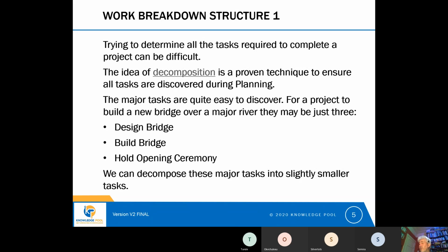You might think that they might start to build the track before the entire route was complete, and indeed they may decide to do that. That is one way in which the engineers in the 19th century would have optimized their project plan, and that would be by starting some of the tasks while other tasks were still underway. So this idea of decomposing the tasks down into smaller and smaller tasks, that carries on until there are no more lower level tasks that can be discovered, or more likely that the tasks start to become trivial.